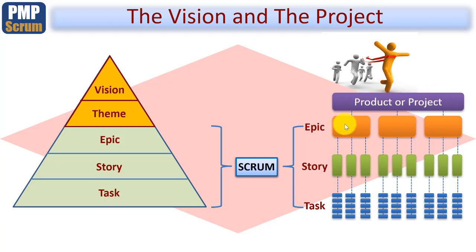Here's these big epics that would sit at the bottom of the product roadmap. And what you would want to be doing is breaking epics down into stories, and as part of sprint planning, breaking down each story or feature into its relevant tasks. So keep a mental note of this graphic. It's not that hard, but it gives you the big picture of how we start at visions, themes, and product roadmaps right the way through to carrying out activities within the sprints and delivering valuable customer products and benefits.